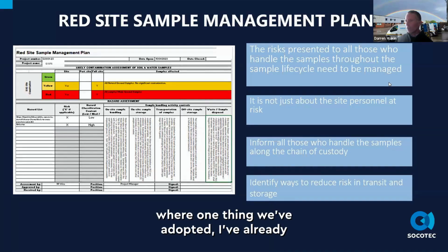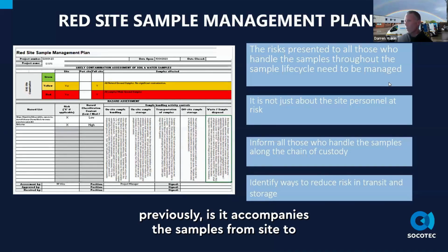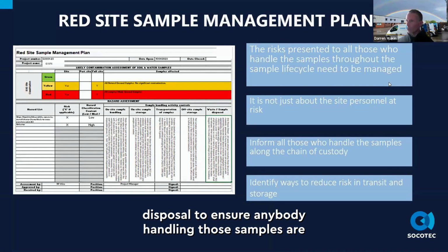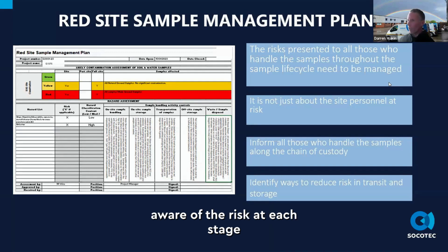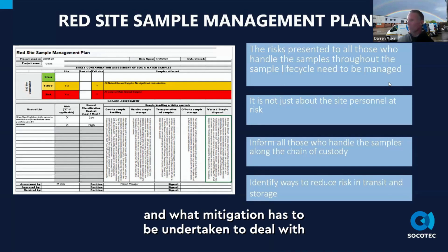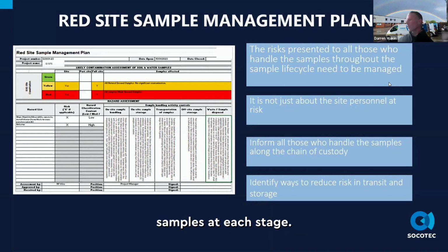So this is red site sample management. One thing we've adopted, which I've already explained previously, is that it accompanies the samples from site to disposal, to ensure anybody handling those samples is aware of the risk at each stage and what mitigation has to be undertaken to deal with samples at each stage.